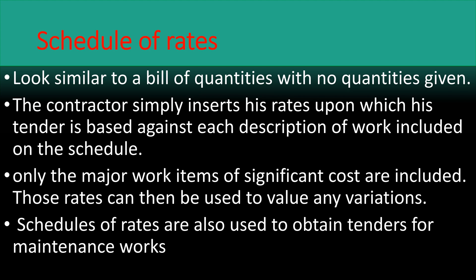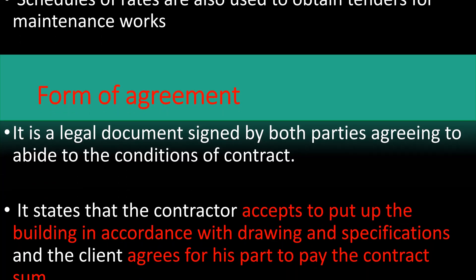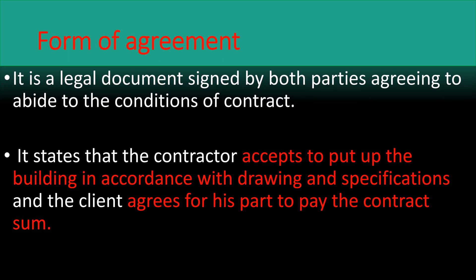The sixth document is the form of agreement. This is a long legal document signed by both parties agreeing to abide by the conditions of contract. It states that the contractor accepts to put up the building in accordance with drawings and specifications, and the client agrees for his part to pay the contract sum. Once the form of agreement is filled, it shows that the contractor and the client are entering into the contract — they have formed an agreement that the contractor shall deliver the building and the client shall pay the contractor.